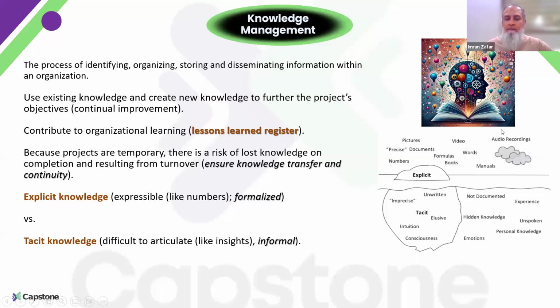It is important to make sure that whatever knowledge is being generated from our project is properly documented, properly organized, so that once the project is over, we are able to transfer that knowledge to the knowledge repository of the organization, so that upcoming or future projects can take advantage of the lessons learned from our project.